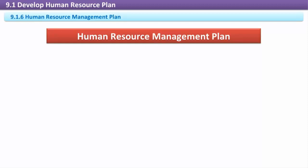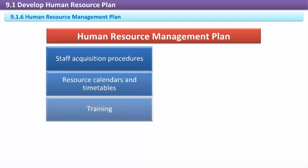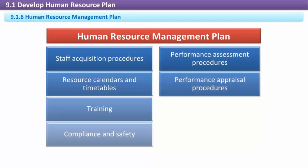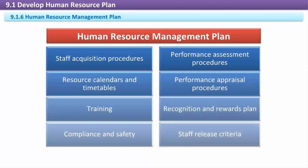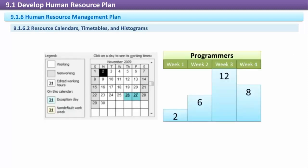How in-depth and formal the Human Resource Management Plan needs to be depends upon the project, but the plan needs to address each of the following: Staff Acquisition Procedures, Resource Calendars and Timetables, Training, Compliance and Safety, Performance Assessment Procedures, Performance Appraisal Procedures, Recognition and Rewards Plan, Staff Release Criteria. The Staffing Management Plan describes how and through what methods the people needed for the project will be acquired, which may include both personnel internal to the performing organization and external to it, such as consultants. It also needs to include any applicable organizational policies relating to staffing or recruitment, and it will also include the planned costs for personnel, whether by role, profession, or grade, resource calendars, timetables, and histograms.